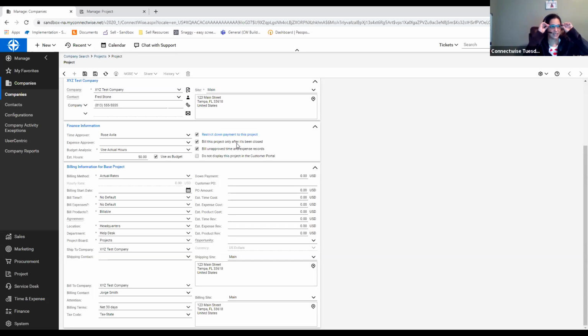So as far as that's concerned, you want to make sure if you're doing progress invoicing that that checkbox is open. Now, alternatively, what that is going to do is always show an open available invoice inside of your invoicing module. So whether you're the person responsible for invoicing on your team, or you have an accounting person or another member of your team that fills that function and role, if you're doing progress invoicing and you're not checking that box, it is very important that you have a good solid process around notifying that accounting person of when it's appropriate to invoice and not invoice.